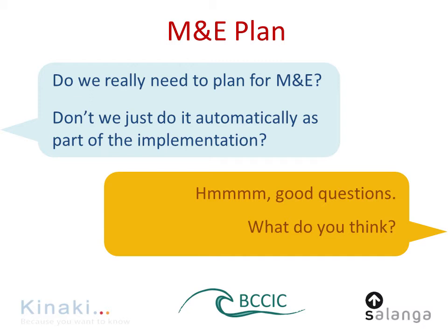And in fact, I believe that thinking about monitoring should start already when we try to do the problem identification, already during the needs assessment, because we should be only intervening in a way that we are able to measure it. So sometimes we feel that some intervention is really critical, but if we don't know how we are going to measure that the intervention is going to work, we should just maybe avoid it, because if we are not able to measure it, we may not also be able to achieve the results we aim for.